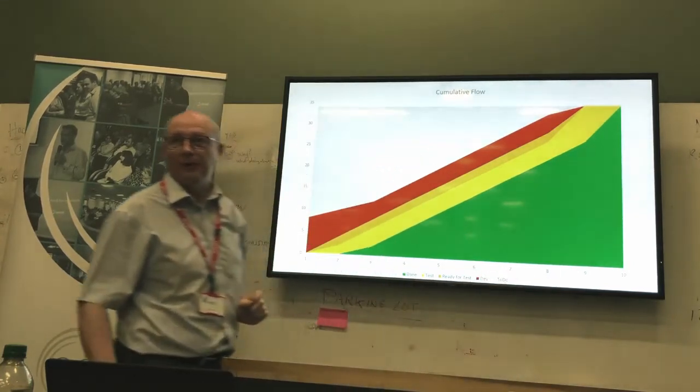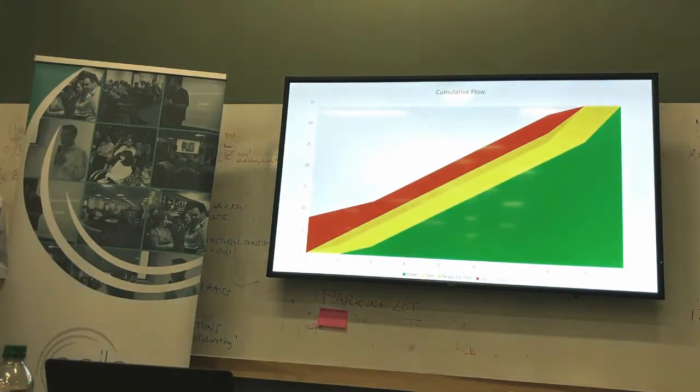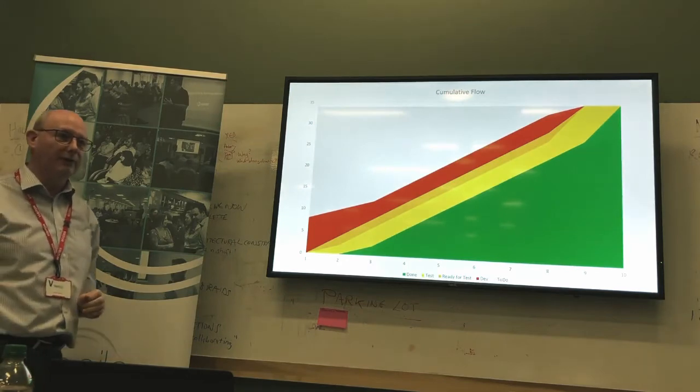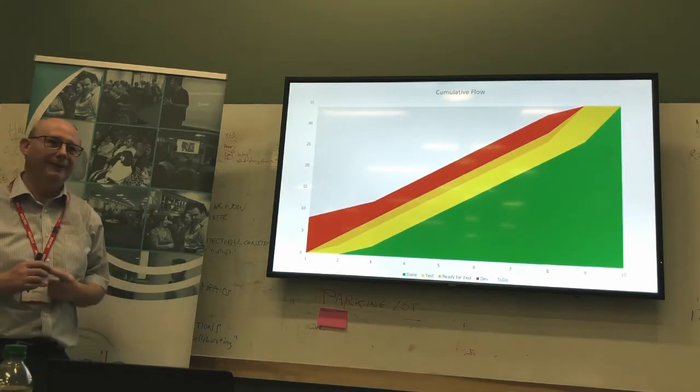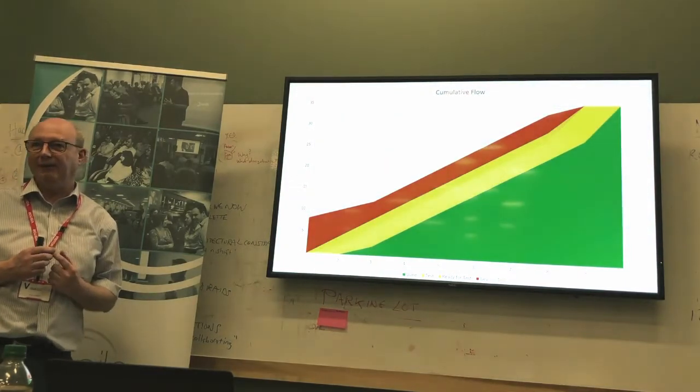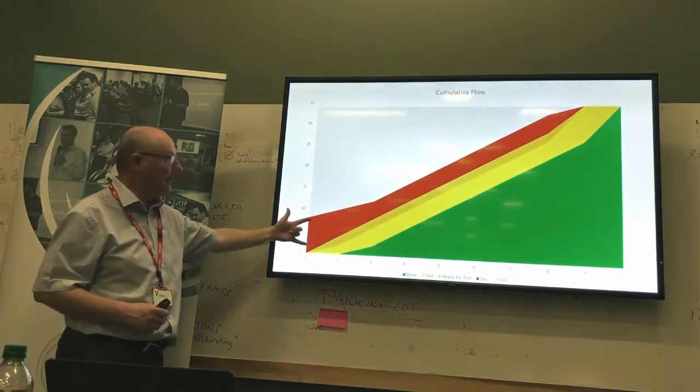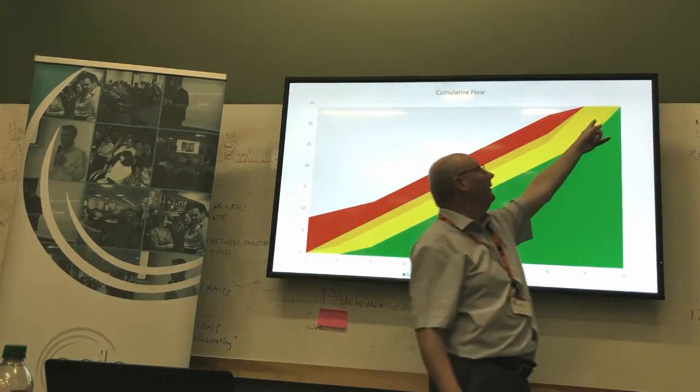What does this tell us about Scrum? Well, you can't have people who only develop, and you can't have people who only test if you want to do real Scrum. Everybody has to do everything, because there is no testing going on here, and there is no development going on here.